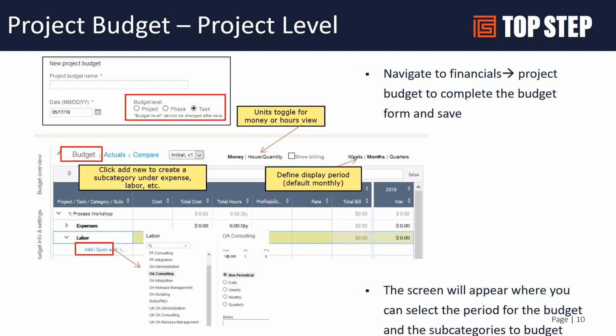You can also bring in the cost from task assignments. You can also bring in the cost from your bookings as well. So if you are using bookings in OpenAir as the basis of your scheduling, you could still use this budgeting feature to bring in the cost from those bookings and be able to then capture those costs for reporting values.